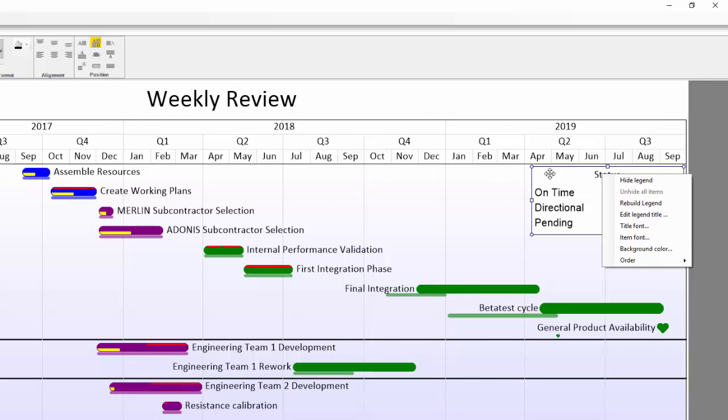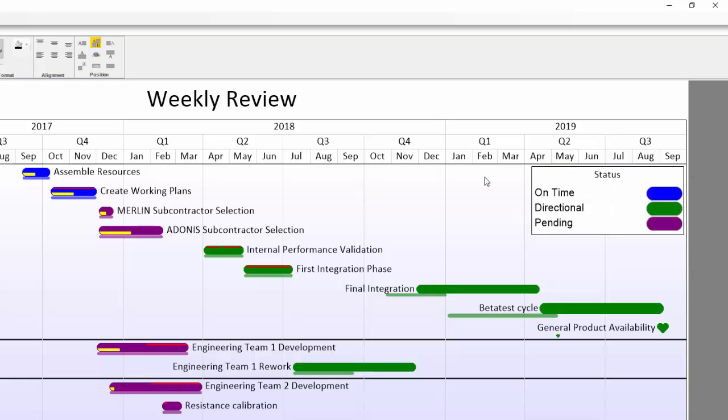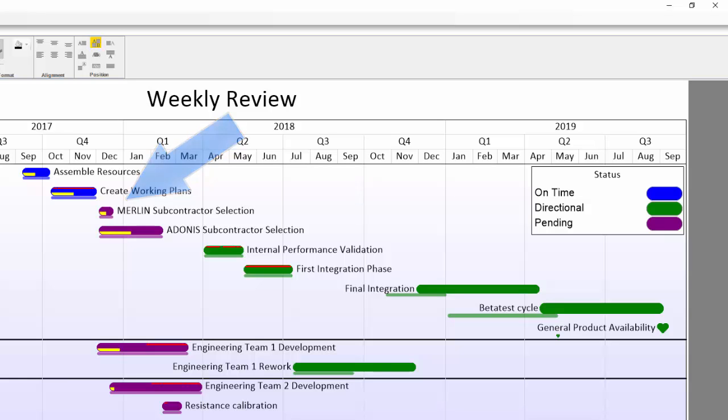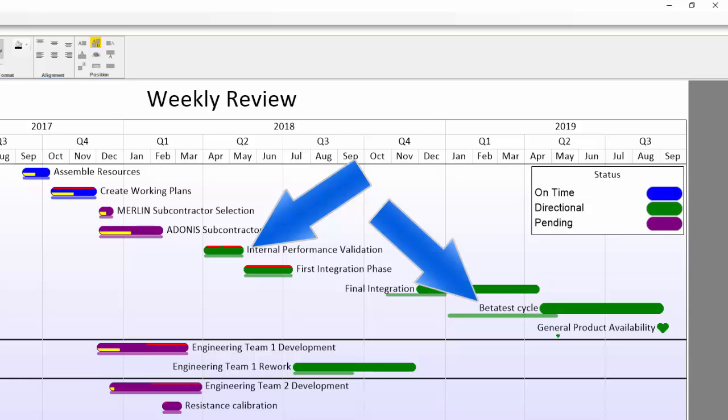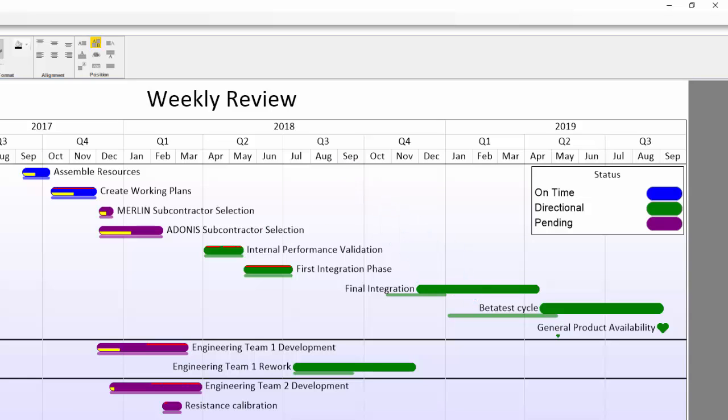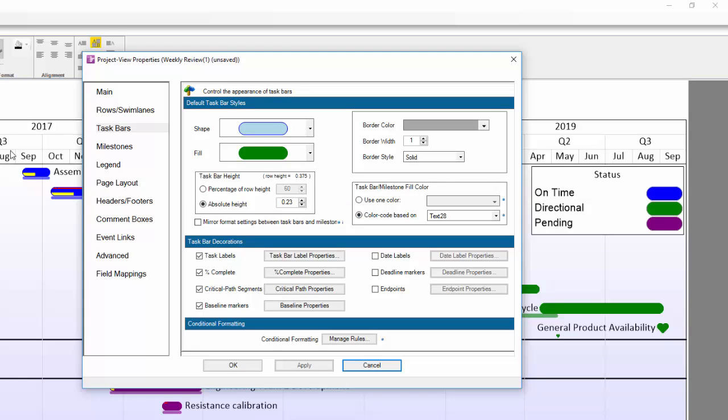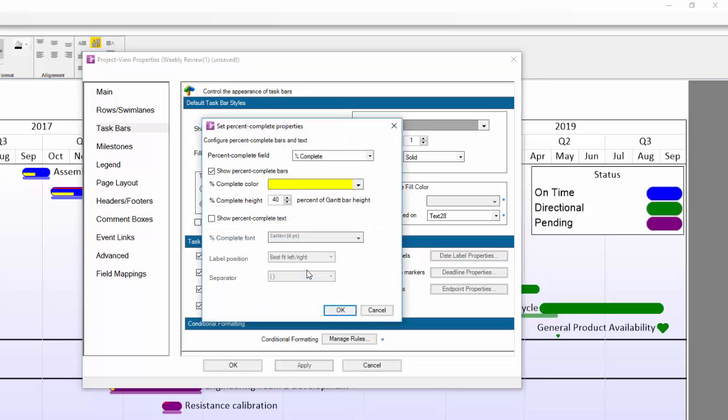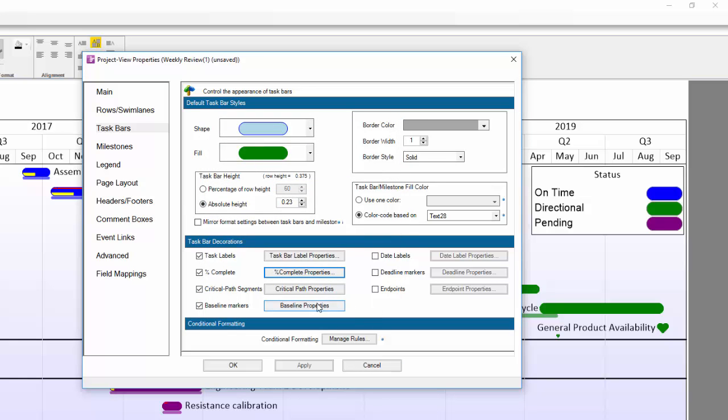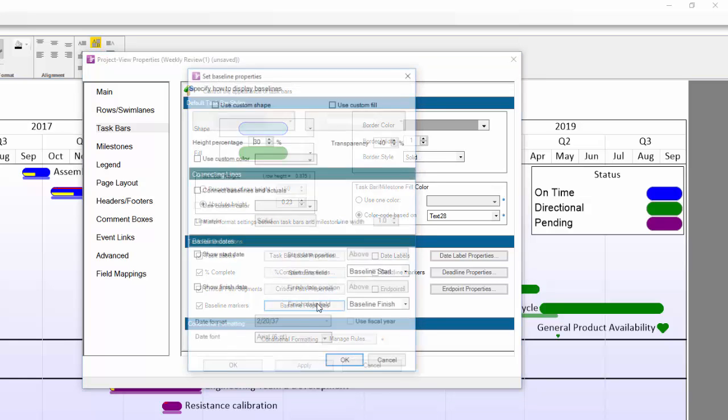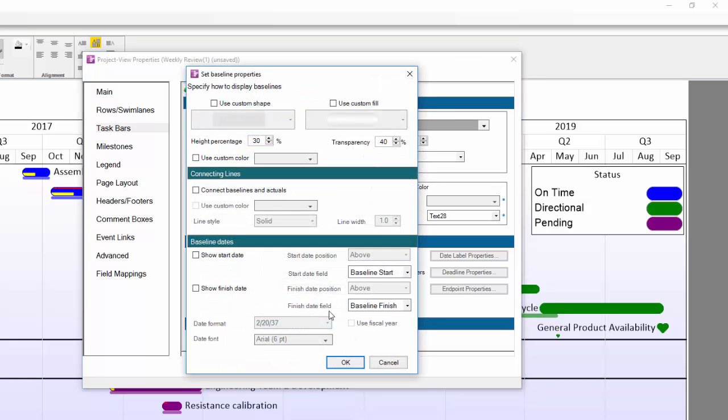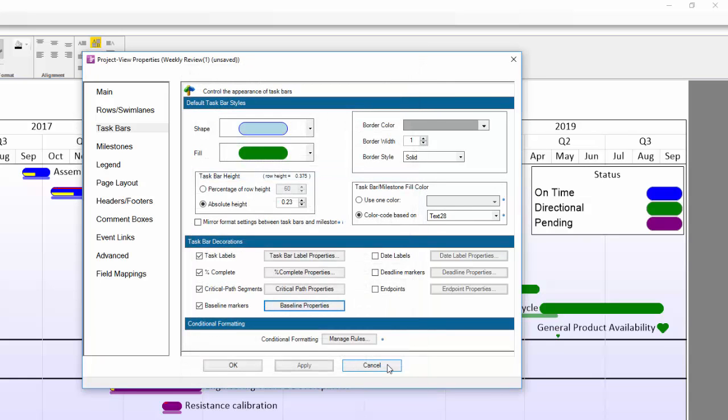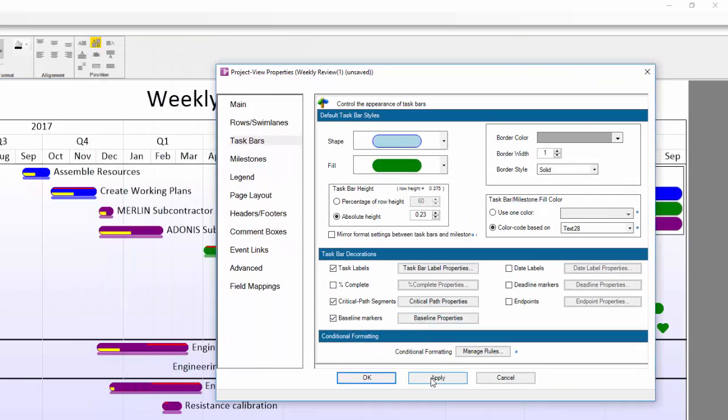In this example, I also have several visual elements in the body of my chart set to display. You see some yellow bars meant to denote percent complete progress visually, red bars meant to illustrate critical path, and also some smaller bars underneath the larger bars which are indicating the baselines. You have full control over percent complete and critical path in terms of color and height within the task bar and even more control over the baselines. All of those items are something that you can turn on and off with a few clicks.